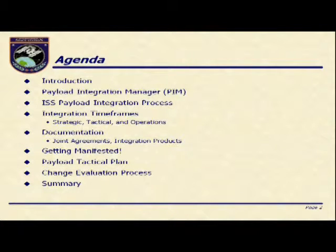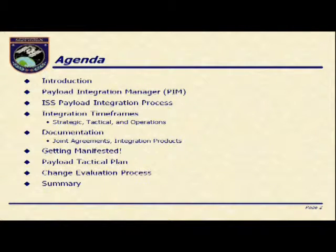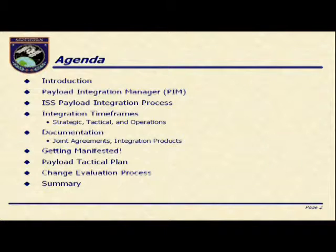We'll talk a little bit about the process in general of mission integration. We assign someone to help shepherd folks through the process called our Payload Integration Manager. They work with the individual Payload Developers and principal investigators to develop a schedule, define the milestones so they know what products they have to deliver and what products the program will deliver for them, and make sure we lay it all out on a timeline so everybody understands the entire process. They'll help you through it every step of the way.